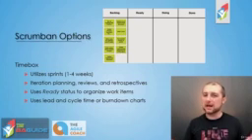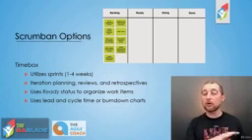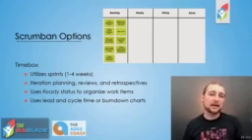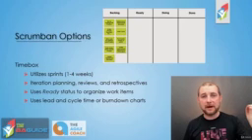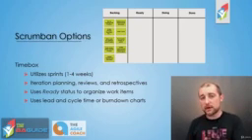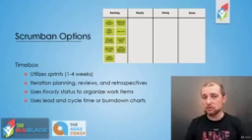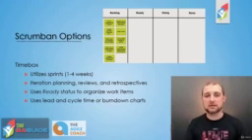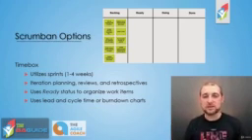Teams will use that ready column a little bit differently. Some will load up that ready column with any backlog item that's ready to go. Other teams will flag various work items in that backlog saying that these are ready, and then they only move them to ready once they're committed to for a particular sprint. There's no right or wrong way. It's really up to your team and the structure and the processes that you use within your organization to help move that forward successfully.